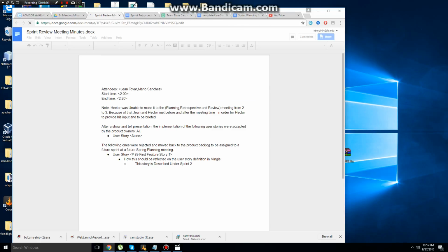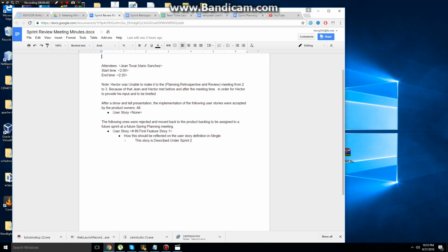Here's the review right here. See, here we put that since we were not able to finish, we couldn't accept the story. The story couldn't be accepted. Our product owner understood that. So we transferred the story to be worked on in the second sprint.